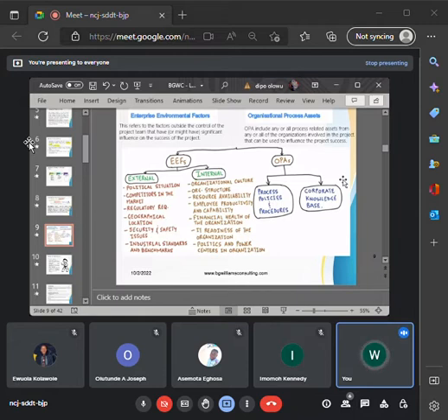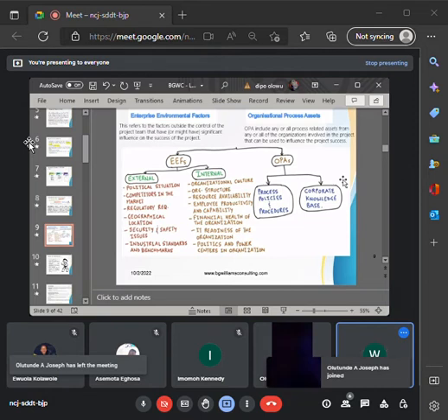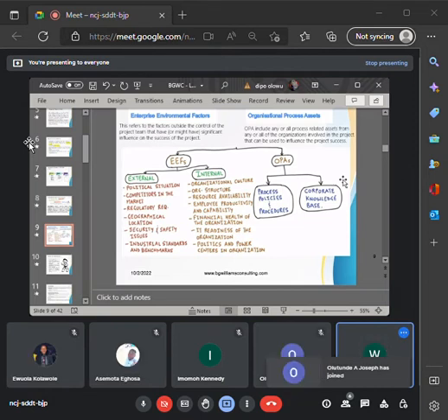So a lesson learned is that meeting that takes place between the project manager and his team, where they answer only 3 questions. And what are those 3 questions? Please take note of them. Question number one, what is it that we did right in this project or phase we just completed? Question number 2, what was it that we did wrongly in this project that we just completed? And question number 3, what can we do differently if given the opportunity to carry out the project again? So those 3 questions define what a lesson learned is.